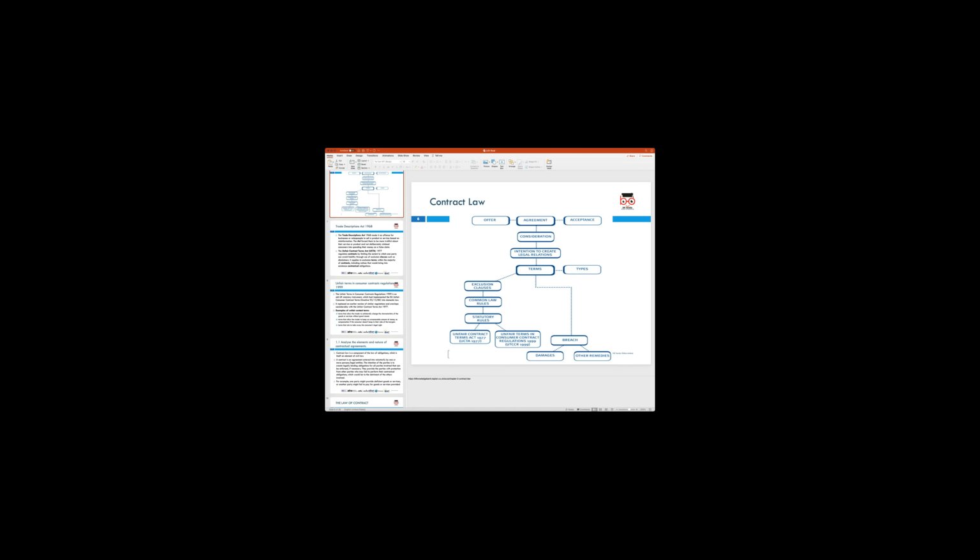And in those cases, the damages being claimed are covered under breach, and these damages could be financial. That would mean they would be liable to recover not just interest costs, but delays or wages or salaries of workers, which the developer is paying when the deliveries have not happened. And there could be lots of other remedies. So one is damages, when you claim financial compensation, and the other could be other types of remedies that you try and build in. These are all defined under the terms and conditions of the agreement. And when an agreement is signed by both parties and becomes enforceable in a court of law, that would then become a contract.